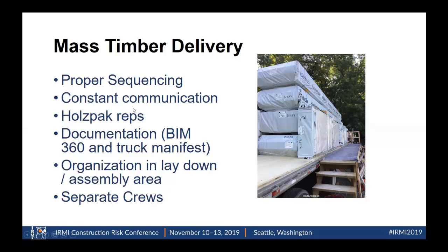As they showed up, we had Holzpack on site, which is the representative for Binderholz stateside. They were on site helping us understand what we were doing, helping us figure out how to unload these trucks, stage it, assemble them in the yard, and then bring them across the street for installation.